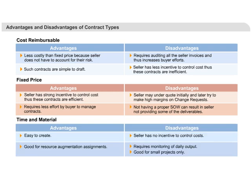In case of a time and material-based contract also, there is no incentive for the seller to control cost. So such contracts are also suitable for small projects only. However, time and material is the most popular contract in resource augmentation kind of projects. Can you think why? Do this as an exercise.